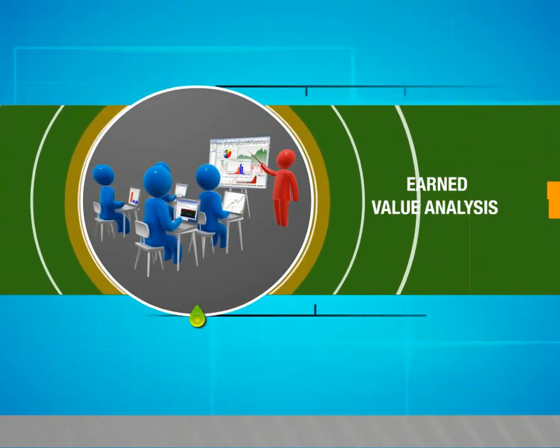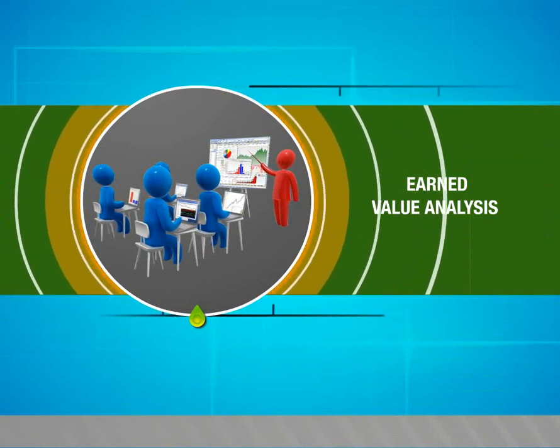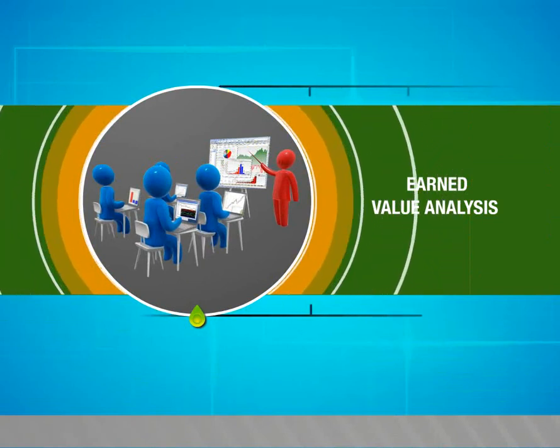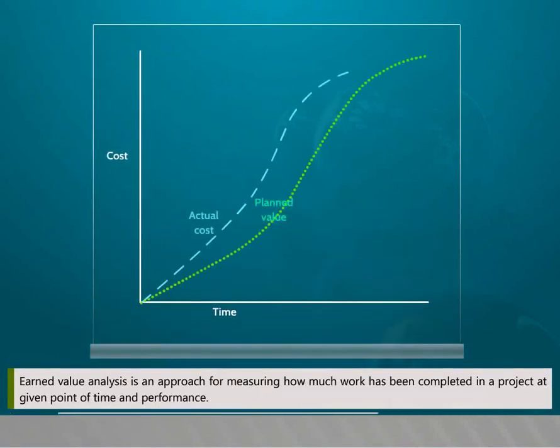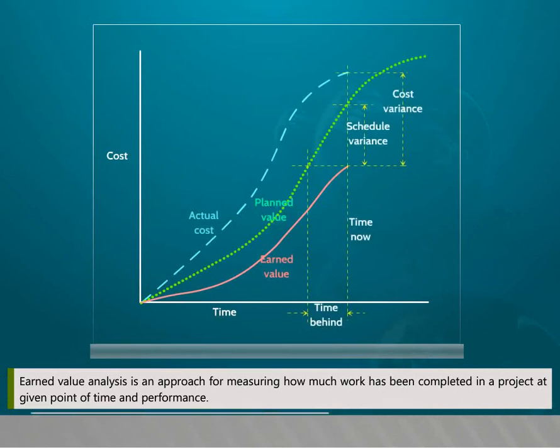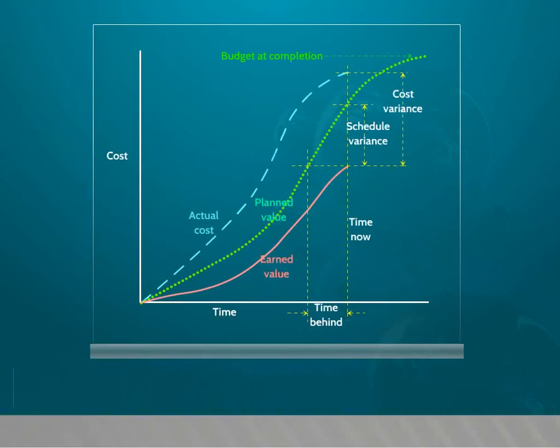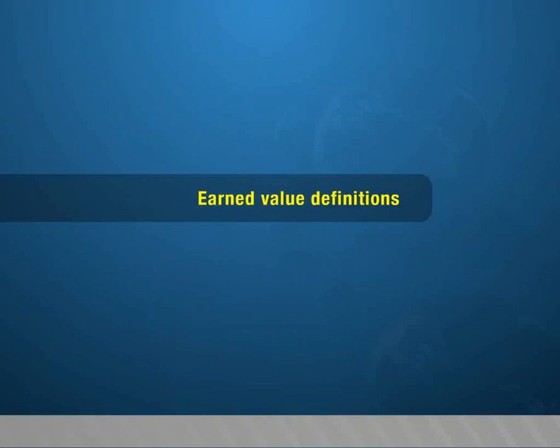Don't spend so much time determining exact numbers on a small work package. Focus your efforts on larger value work packages. Remember that measuring progress is an estimate and that the inherent errors on each work package will tend to cancel out as you roll up the progress numbers to a project level.